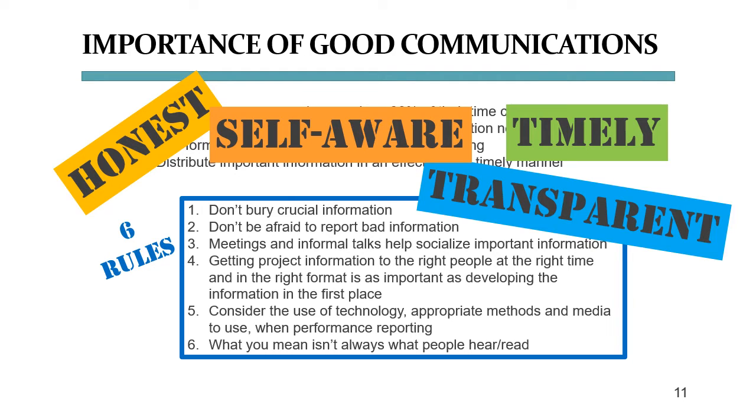And be sure that you know who is allowed to get what information about your project. In many organizations, outside contractors are not allowed to have any insight into project budgets and finances. So if you even just inadvertently publish that information, you and your organization could get into a lot of trouble. We will in fact talk about this point again when we develop the communications management plan.